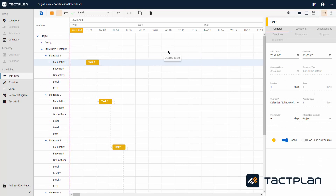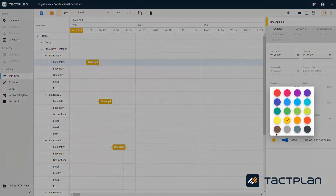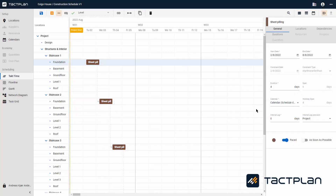Once selected, click on the locations where the task is to be performed. Once the task has been added to its locations, you can name it Sheet Piling. Specify its duration, for example four days. Give it a color — you can choose the color brown and give all tasks related to foundation works the color brown.